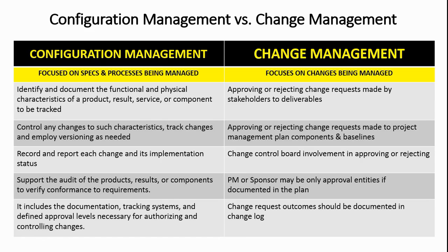Not every project should have or does have a change control board. So bear that in mind. And also, change request outcomes should be documented in the change log. So if you look at these two, though they are related, they are focused on different things. Okay? I hope that helps.